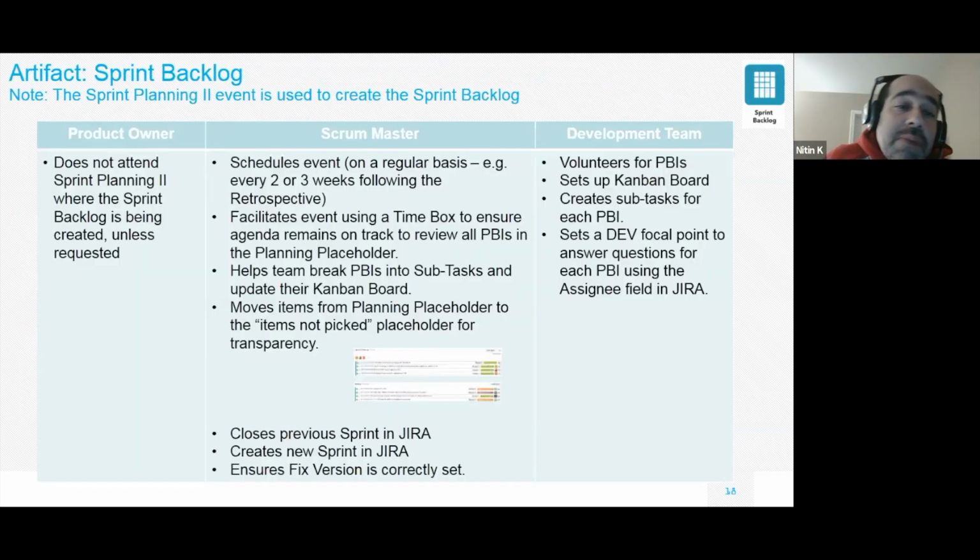And if I could supplement a little bit there, Bob. Sure. All Scrum says is visualize the work. And that is so important. So you can get in a Kanban board, and it works really well with it. Some people get into some tension with Kanban versus Scrum, or some hybrid thing with Scrumban. But all we're saying is really, again, make the work visible. And then with some advanced concept, you can get into WIP limits, which is work in progress, and that'll tell you where your bottlenecks are. So it's a great board, and it's a great tool.